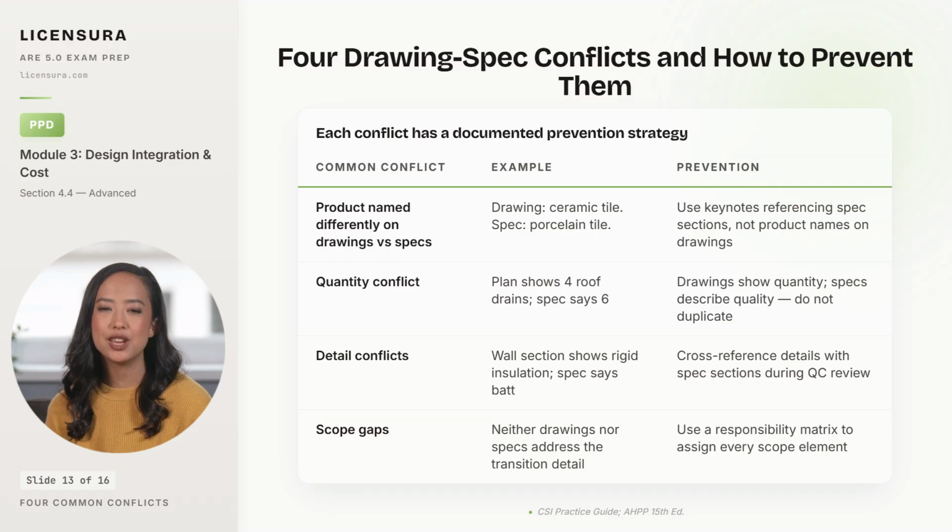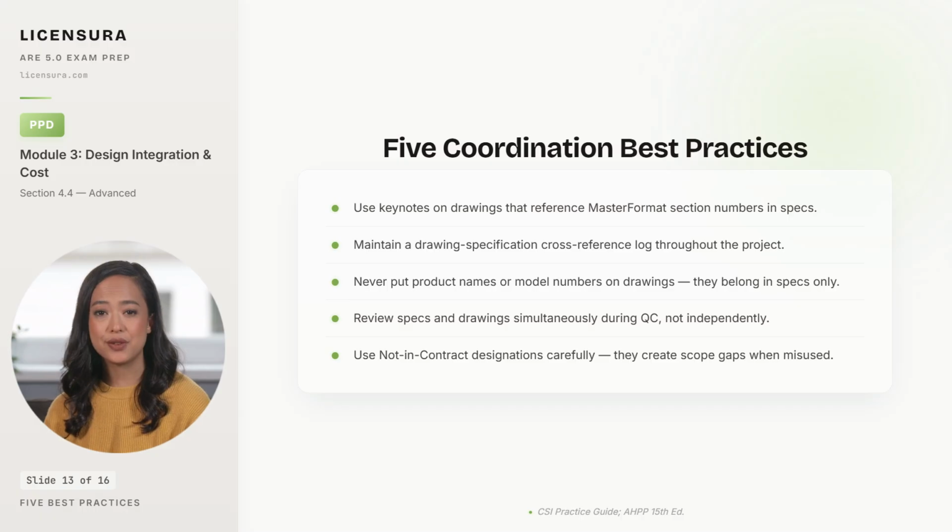5 practices anchor the coordination workflow at every milestone. The exam tests each one. 5 coordination best practices separate a defensible set from a litigation magnet, and the exam tests each one as a standalone rule. First, use keynotes on drawings that reference MasterFormat section numbers in the specifications.